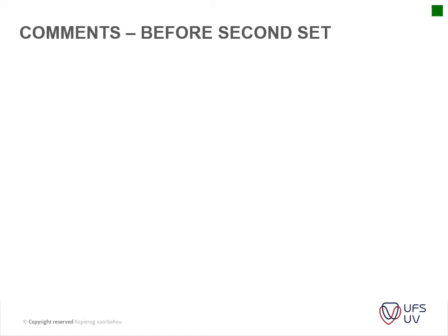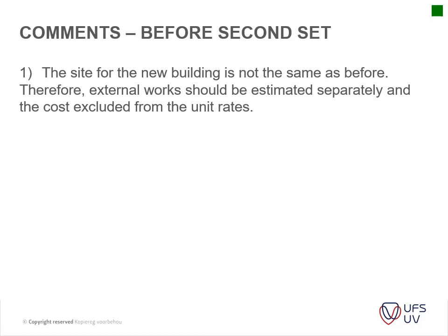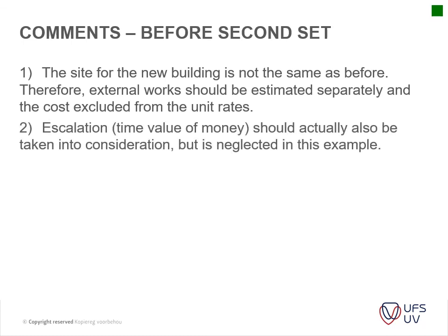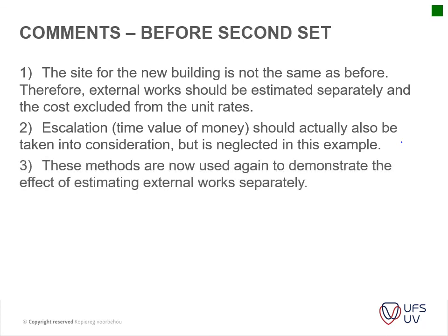Okay, so I'm just going to stop the video here and then I'll make a new video, but these are a few comments on those calculations that we did. The site of a new building is not the same as before, therefore external works should be estimated separately and the cost excluded. So you can go through this. I'm going to go through these items again in the next video, but basically we did a very basic calculation here in this video, and then in the next video we're going to improve on that.